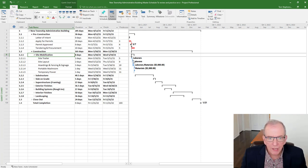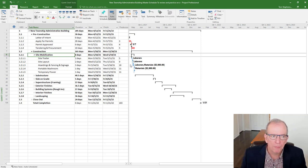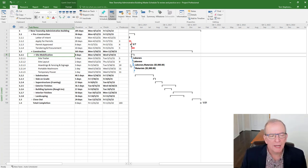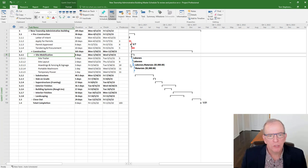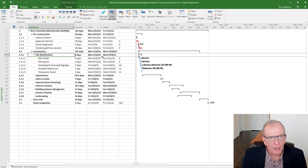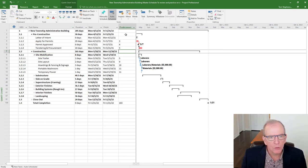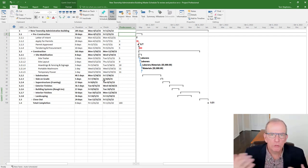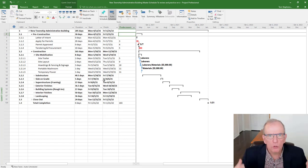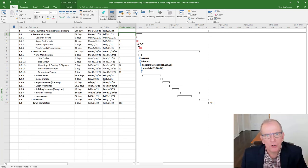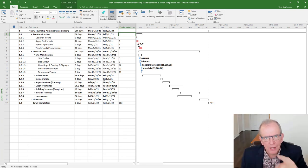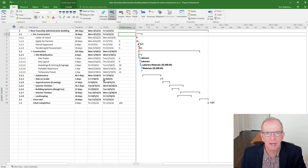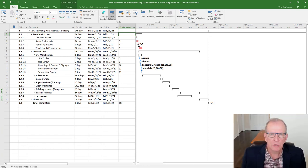And then at the lowest level, I've got my activities and they should be linked in the order that I want to run my project. So it's helping me to organize the overall project and related to a work breakdown structure should be also how you link your activities and you don't want to have activities linked to headings. I finished this activity. I start the next activity. So it gives you a good idea of the sequencing.